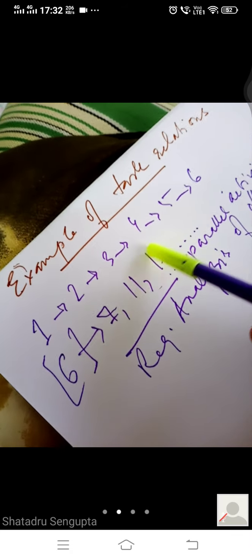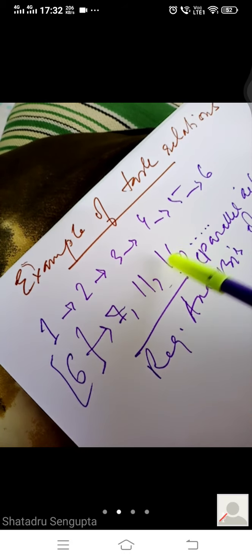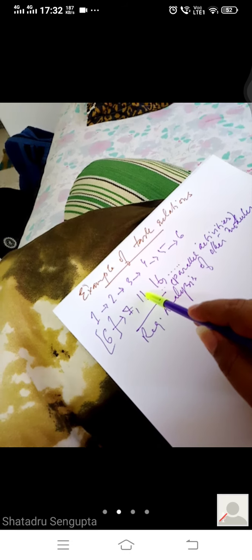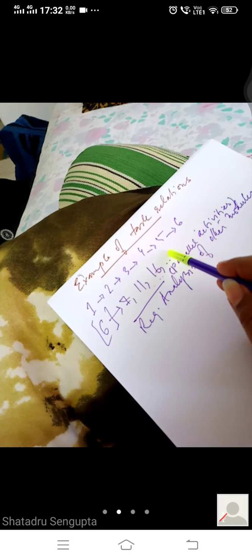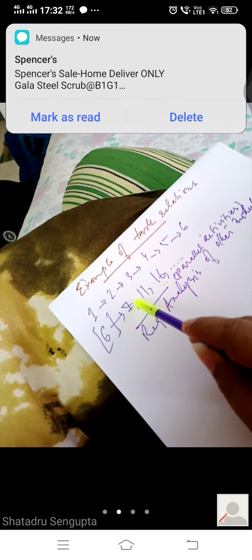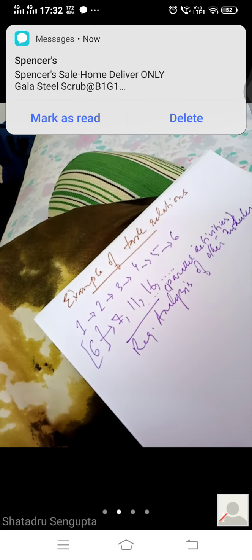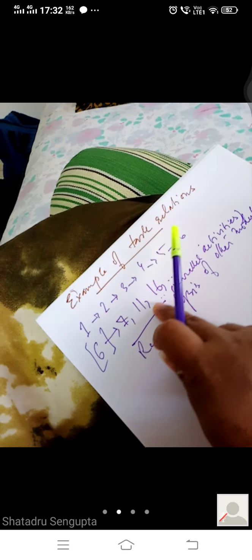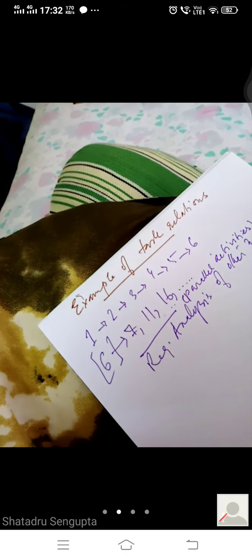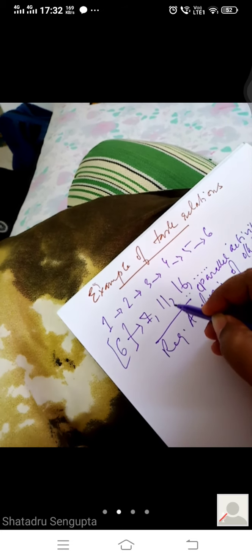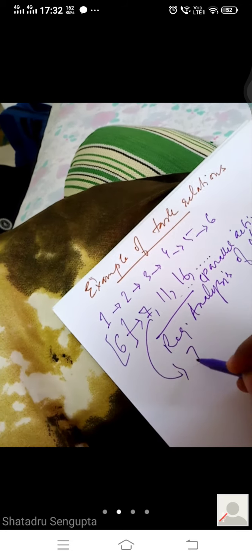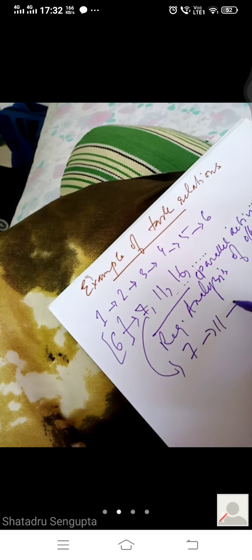Now you see, although these are actually parallel activities, that means they can be done in parallel with each other. Now let us say that we have only one team doing all the requirements analysis. In that case, 7, 11, and 16 may not be parallel. For example, if the teams that are available are doing 7 and 11 and 16 all, then you will write it like this.